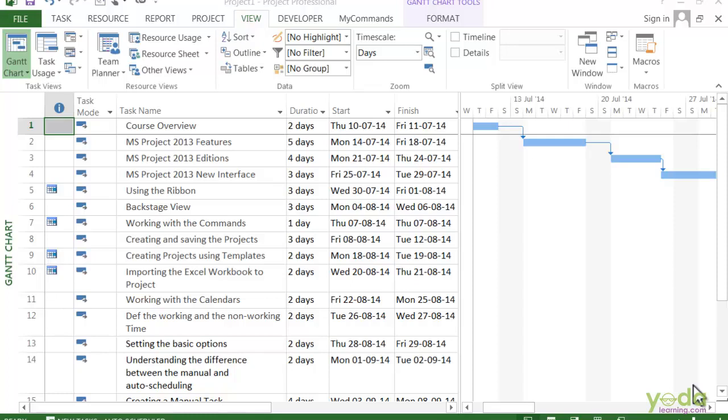In Project, you can create a summary task for several existing tasks or create a new summary task with its own new subtasks. Let's say you want to organize some existing work tasks. For example, you can just drag over the task name cells to select the tasks.